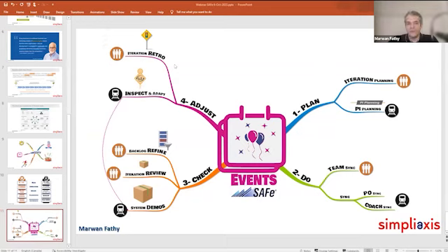This is on the team level for the adjust. But on the art level, group of teams, there is a very important 4-hour event called the Inspect and Adapt. We go through very important and insightful metrics to see how did we perform against the benchmarks, to look at where do we stand from what we committed to, did we complete it, did we achieve it, all of those things. And of course, to present to the customer, what did we achieve?